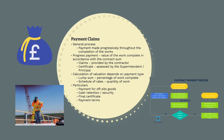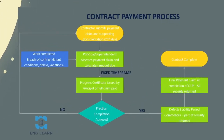A lump sum item may be calculated on a percentage complete, while schedule of rates will use quantity of work actually completed. The contractor will need to specify particulars for variable situations — for example, whether the contractor can receive payment for goods stored off-site, requirements for cash retention or security, the process for issuing a final payment certificate, and any payment terms and requirements. All of this will be defined in the contract.